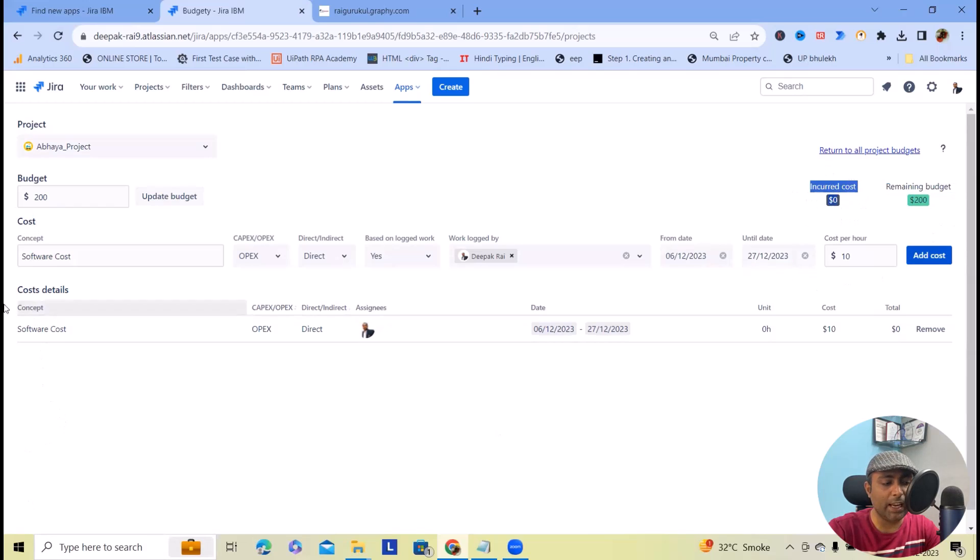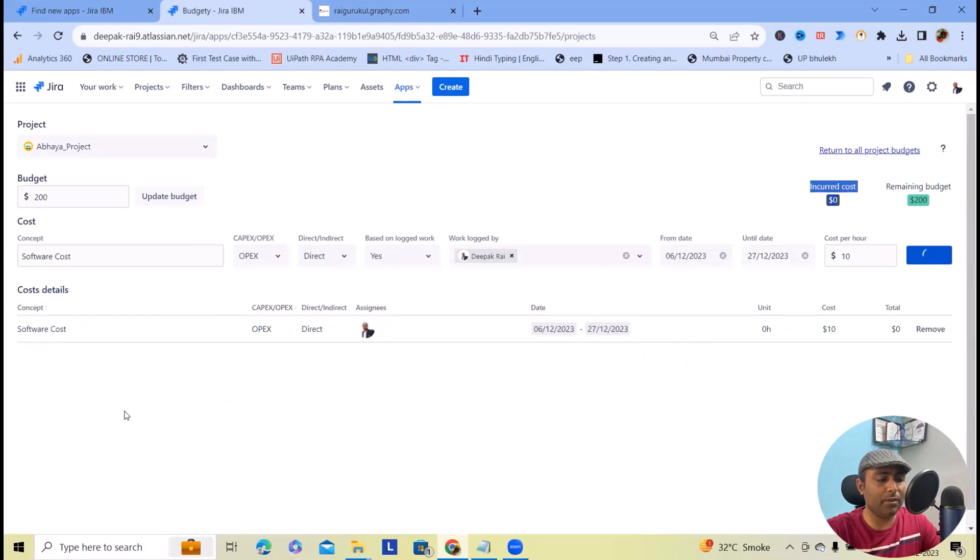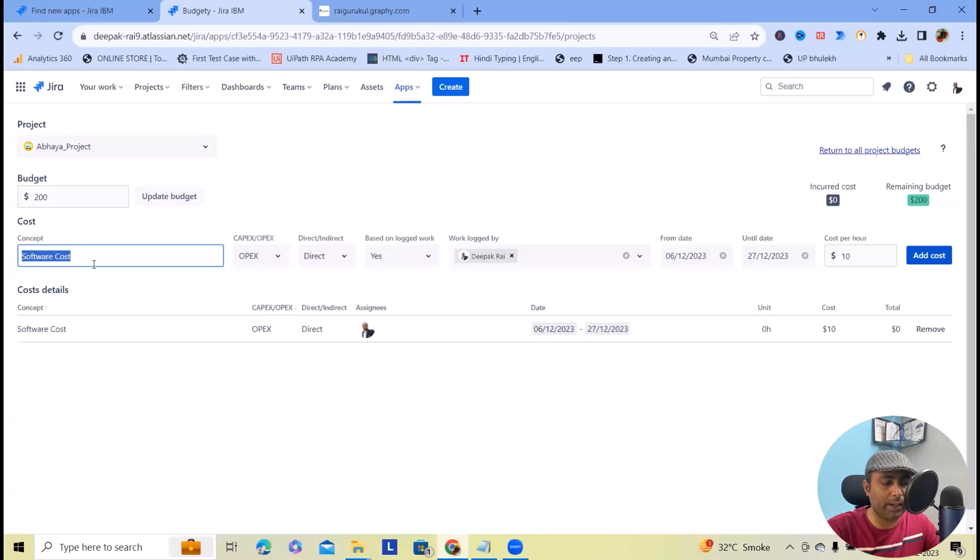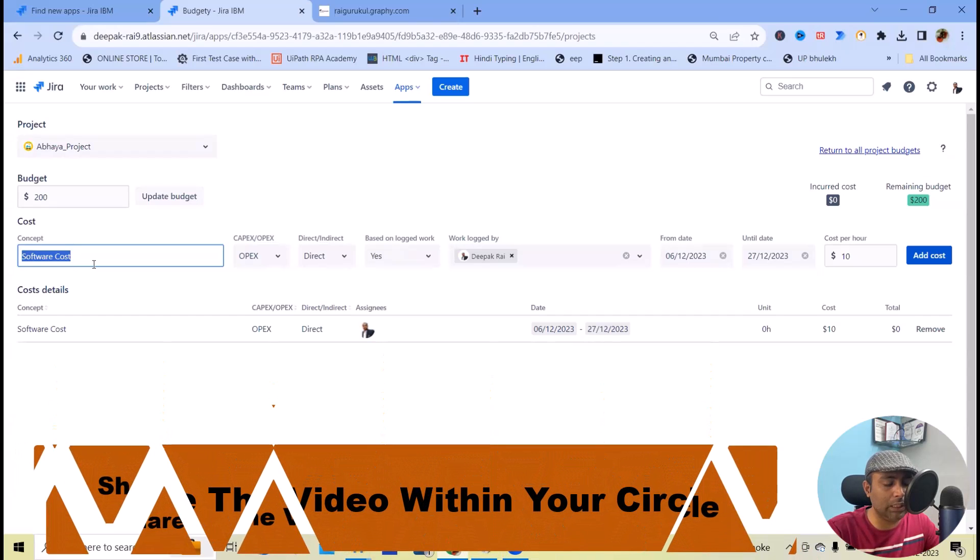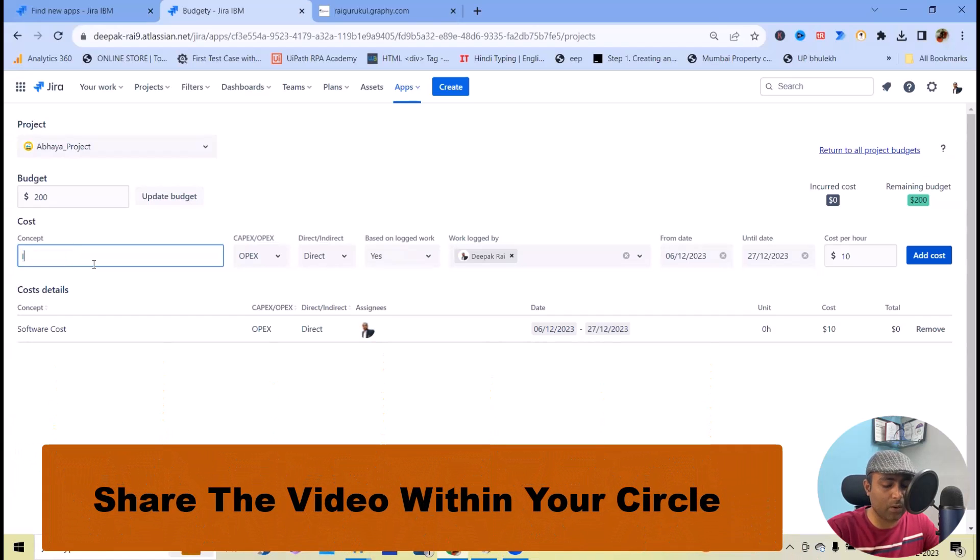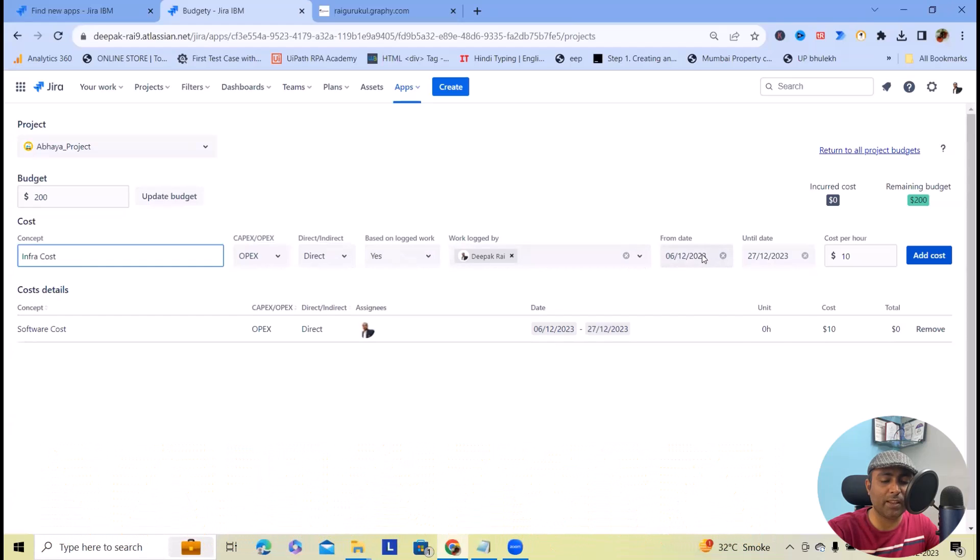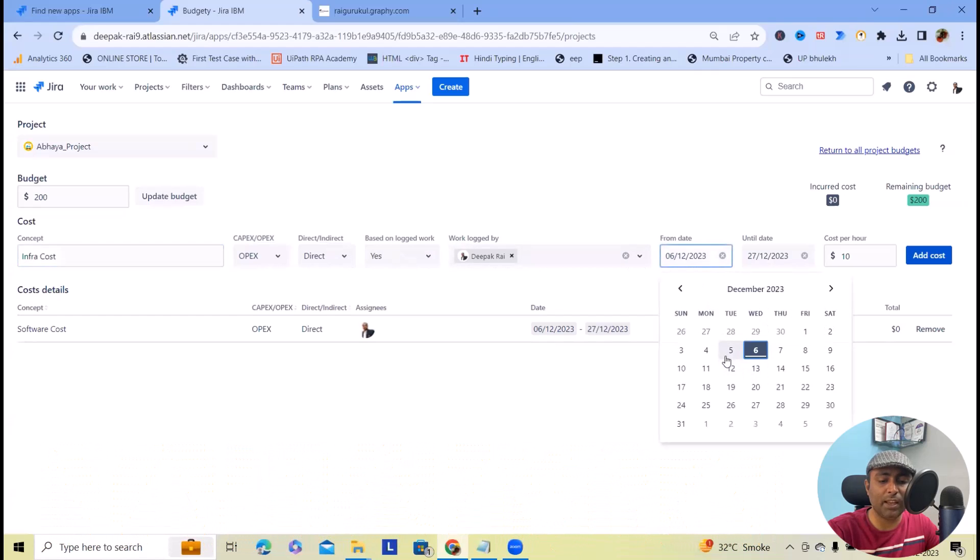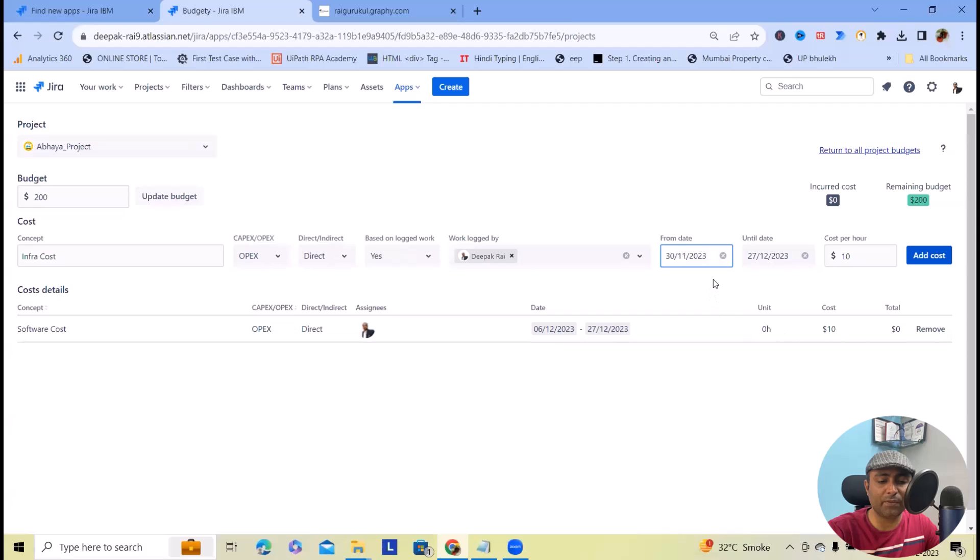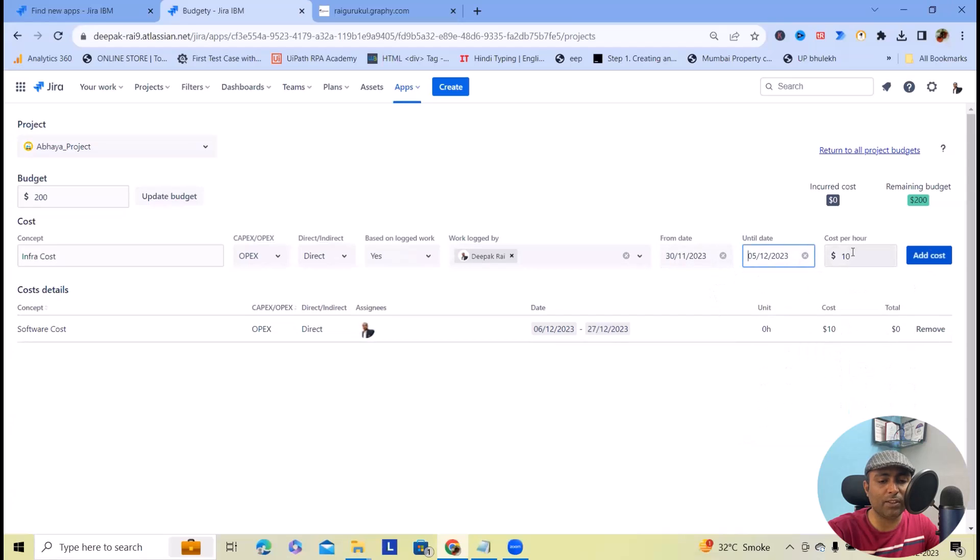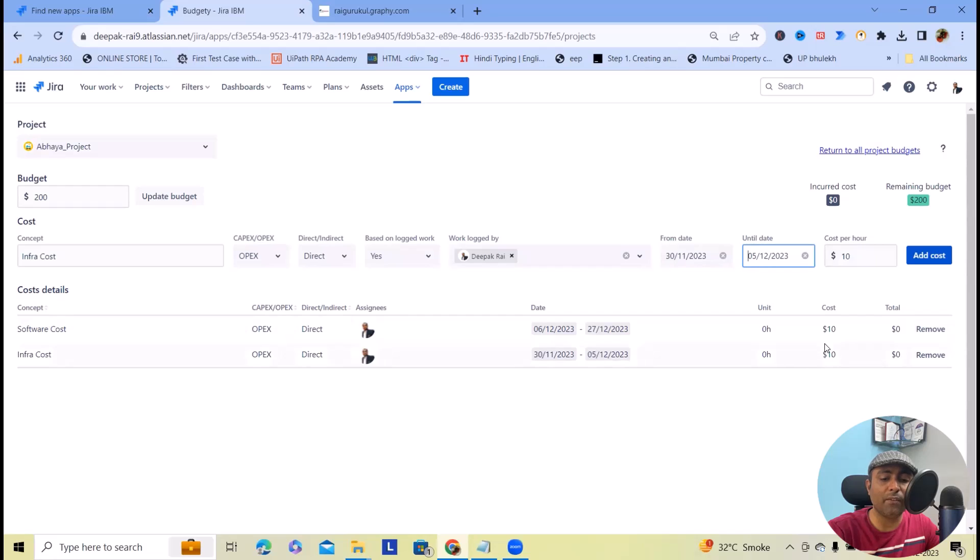In cost detail, we have just defined software cost. But here I want to add one more cost—infrastructure cost. Again, this is OPEX Direct. I want to specify the rate as $10 for this one as well.